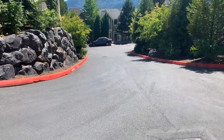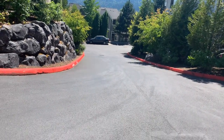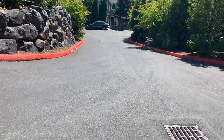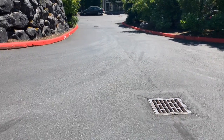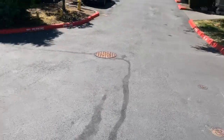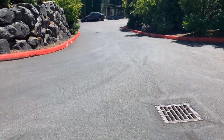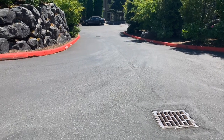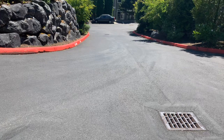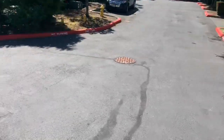So on my change order, I'm adjusting the change order to include the asphalt repairs now, the curb repairs. There was 100 feet of red painted curb to do on that, but I saw that 100 feet of curb is already painted. So our guys already painted it. So I'm going to take that off the scope, and instead I'm going to implement these curb repairs and the asphalt repair. Make sure the stop bar's in there. Make sure all the 15-mile-per-hour stencils are in there. And then make sure these 5 hydrant markers are in there as well.